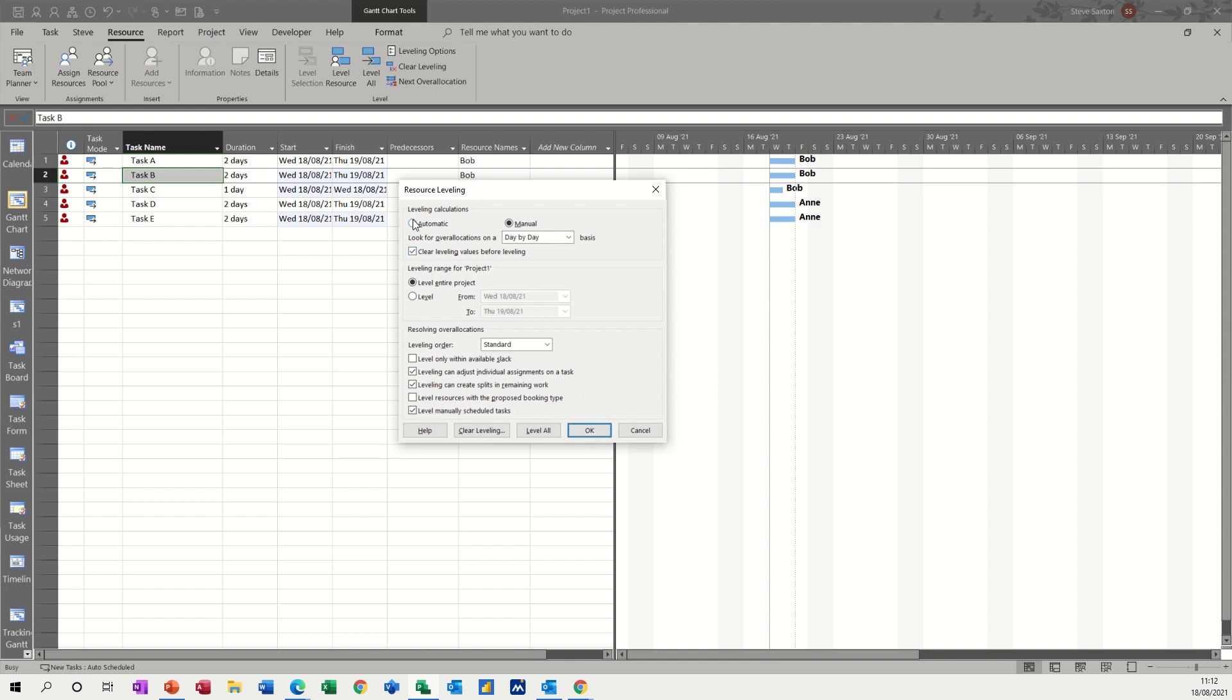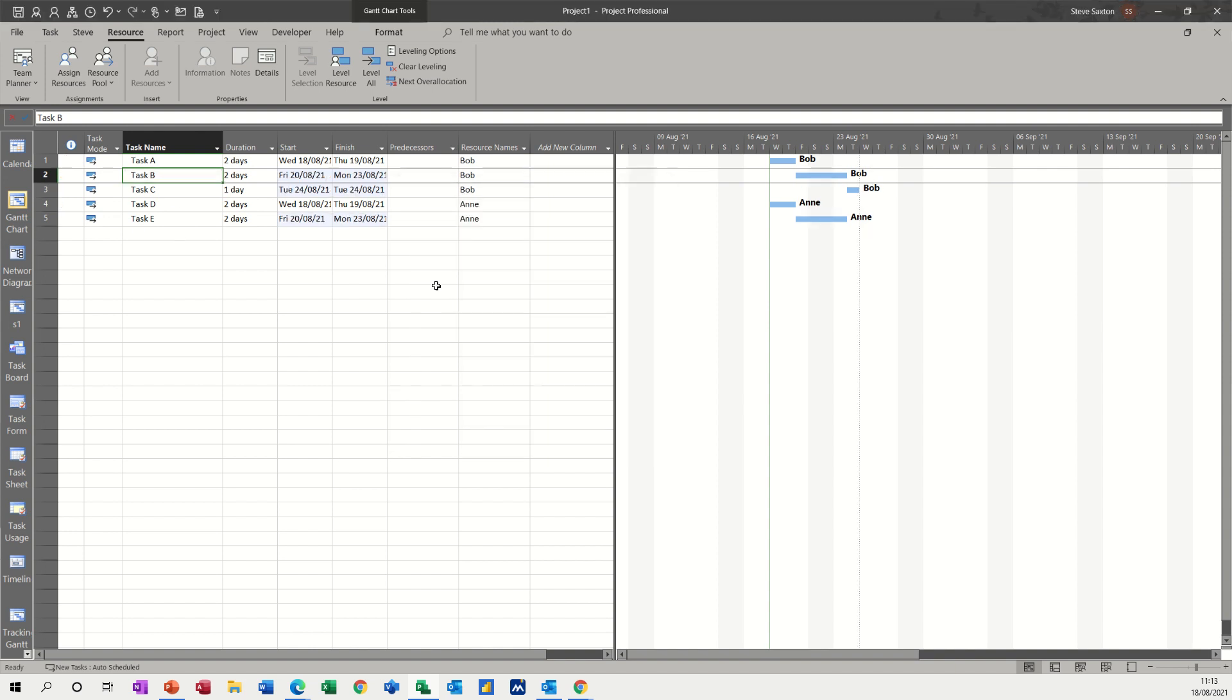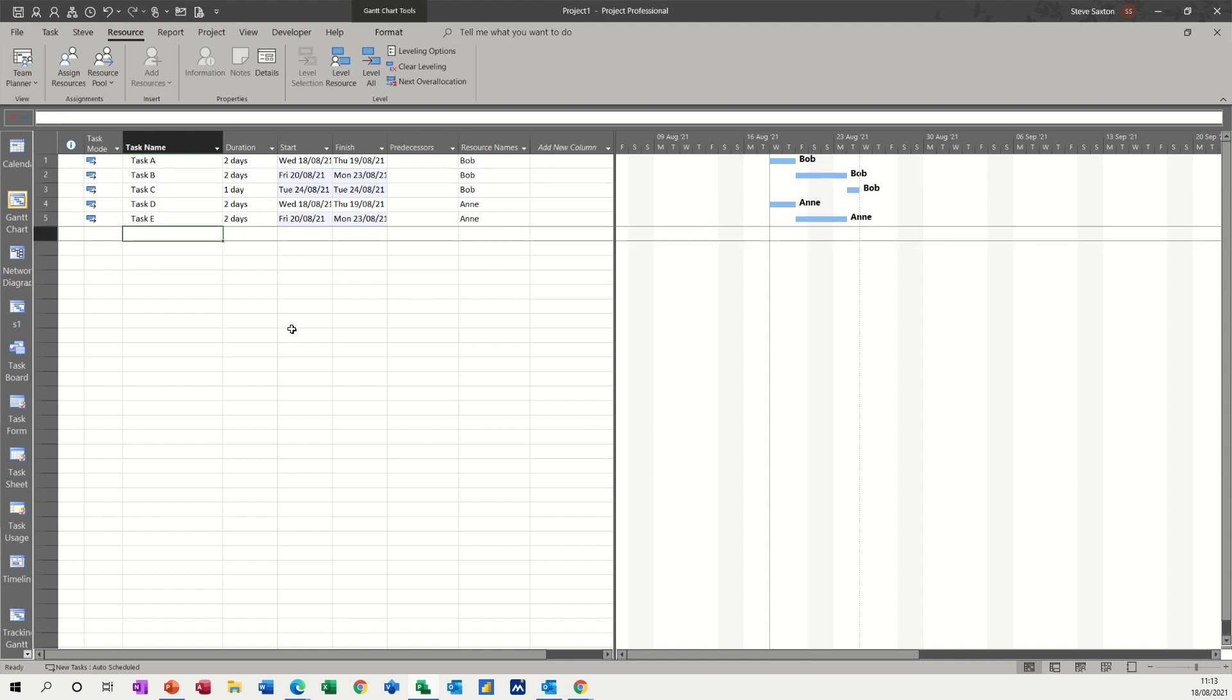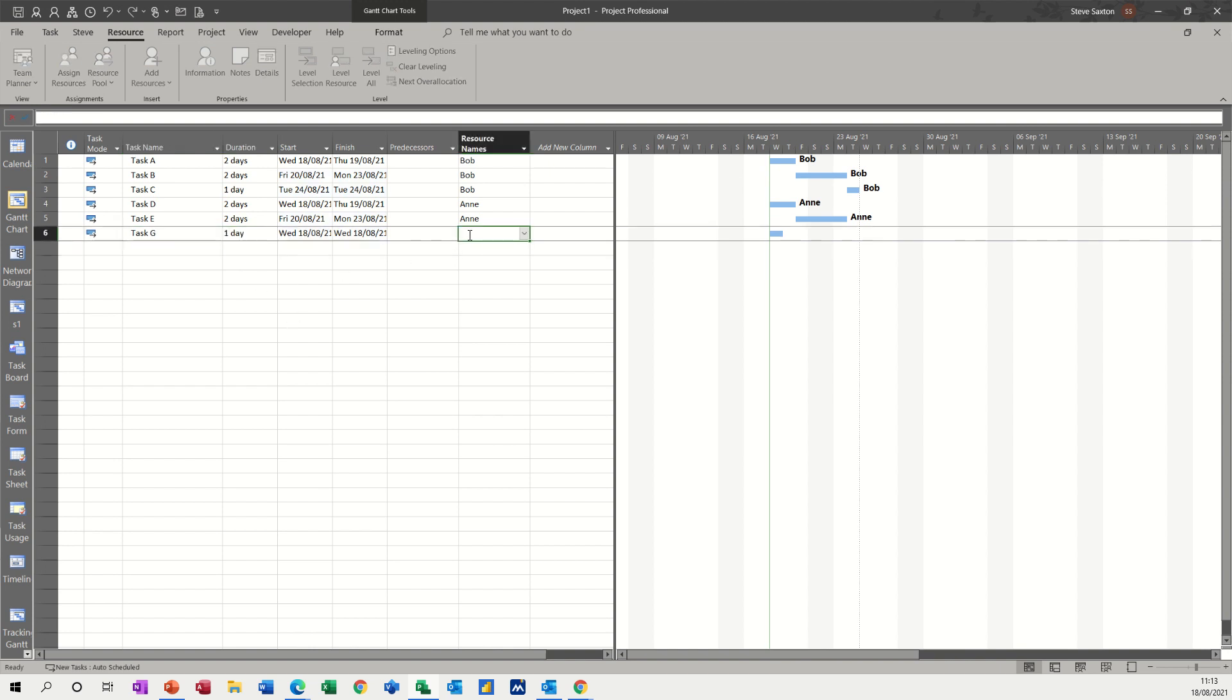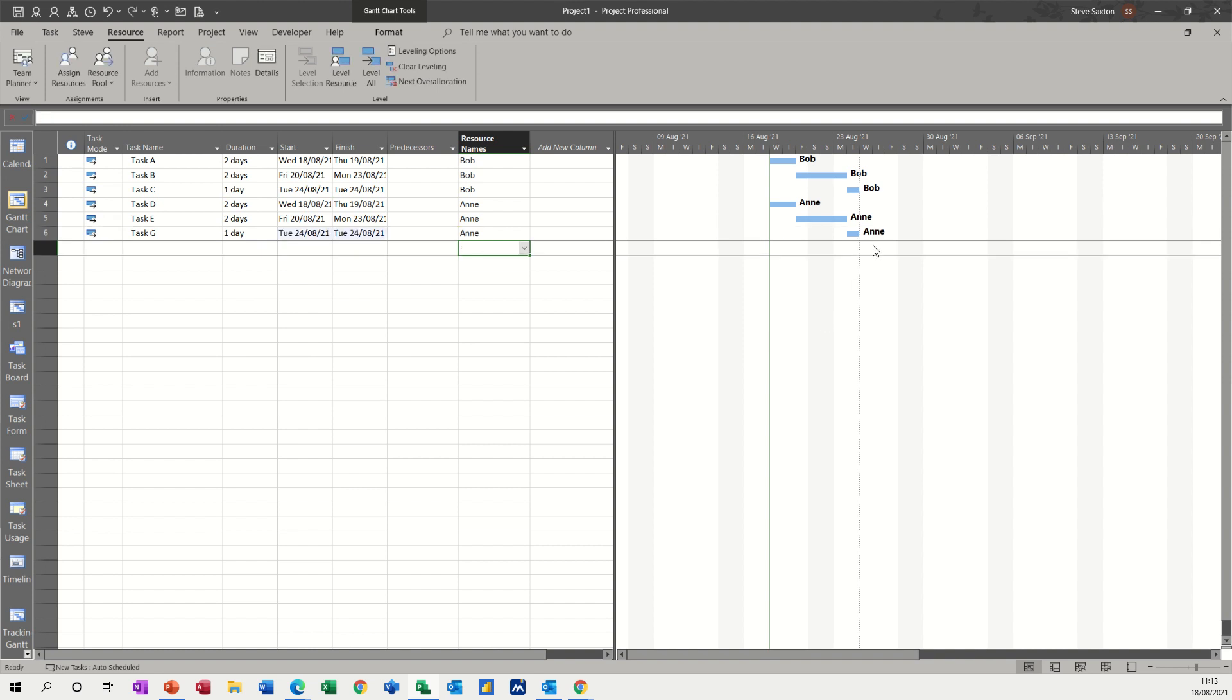But standard is the default. So if I set this option automatic, what happens is that as you allocate people, they will automatically move. So if I just click on automatic and then OK, see they've already gone. So if I do another task, task G and put one day, put Ann on it, because automatic is on, that's shifted straight away and it's gone across to the right.